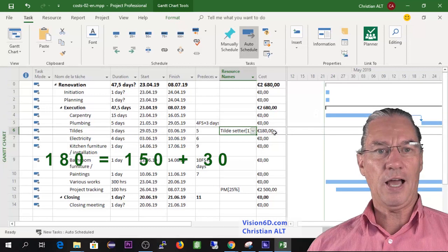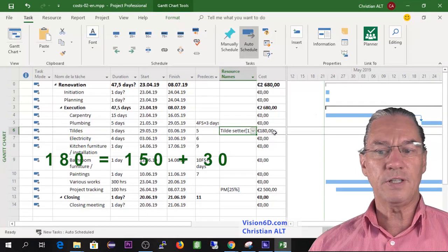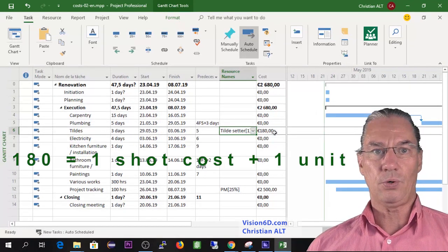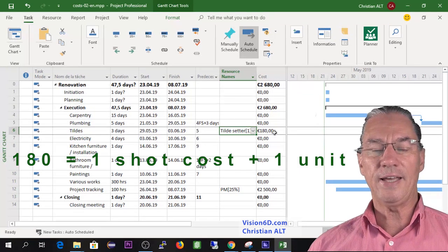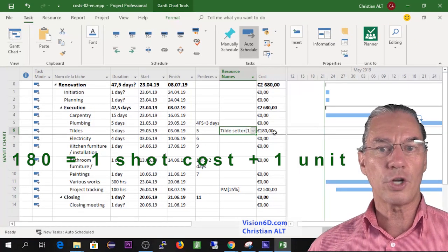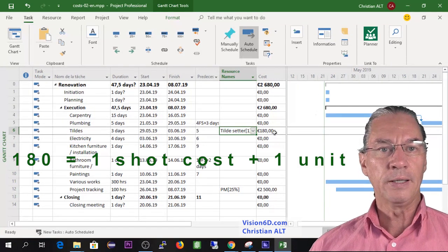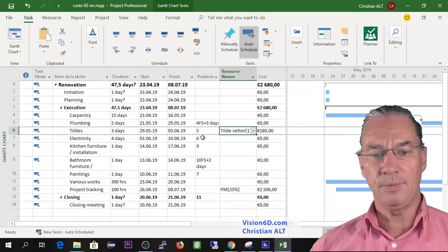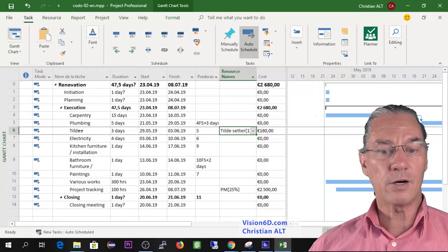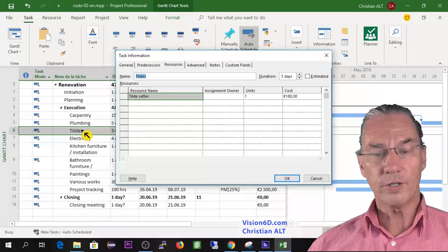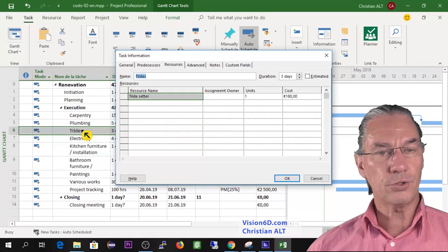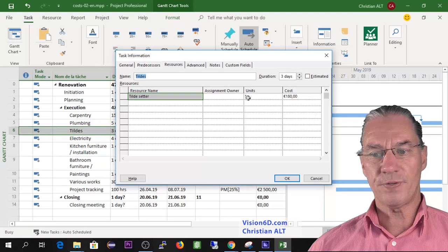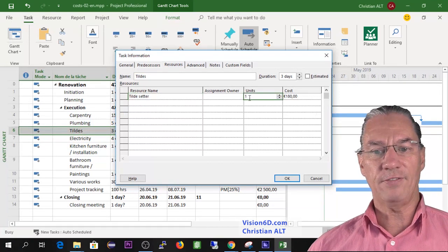You see that for the moment there is a cost here, it's 180. 180 is 150 plus 30. They took one unit and there is that one-shot cost of 150. The two of them make those 180. Of course they are going to do more than just one square meter, those tile setters. So it's what I'm going to do here.